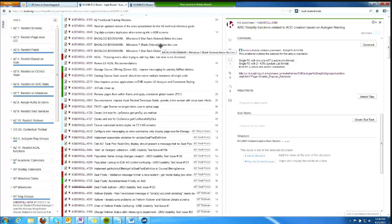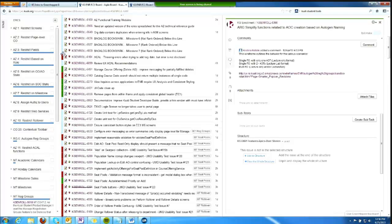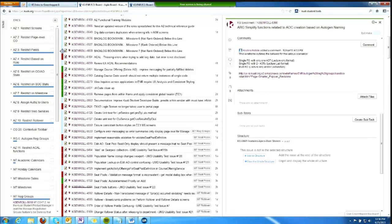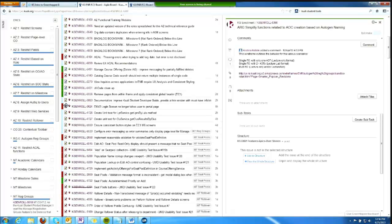Product owners and I do this by dragging and dropping tickets up and down this list. Core team leads, since core teams like QA, UX, services, and tech don't have product owners on them, work to define some team-specific priorities that I discuss with them. They can drag up and down to manage their priorities and get those reflected in their team's board.